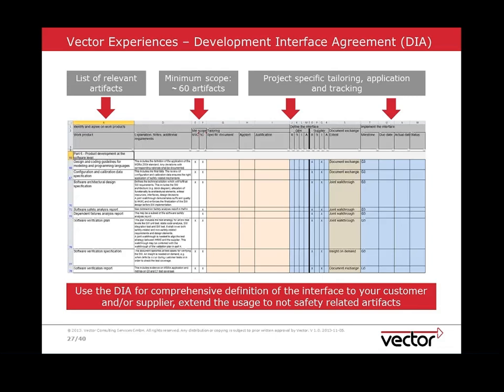And for that reason, it's good to do that in the beginning, and then also make clear who has which responsibility, when it is to be budgeted, in order to avoid a situation, as we observe, unfortunately, quite frequently, that a component could not be released by a supplier, and therefore also slows down the whole release process, just because some safety-related activity still has to be processed, even if everyone around the table would say, well, but we are actually on a critical path and we are getting late.